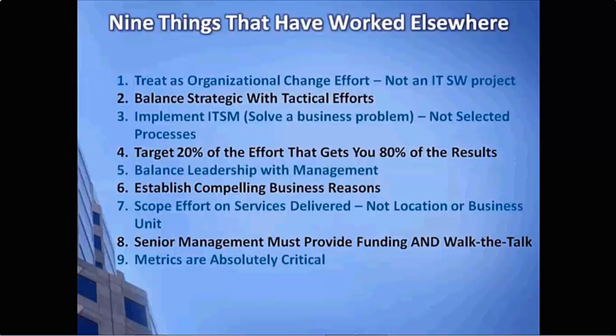And then lastly, number 9, metrics are absolutely critical. You should start measuring your processes and your solutions starting from day one. Even if you don't have the capabilities in place, put that as a to be determined and then start filling those in as you start to proceed down your implementation effort. That alone will show management that progress is being made and things are moving forward.